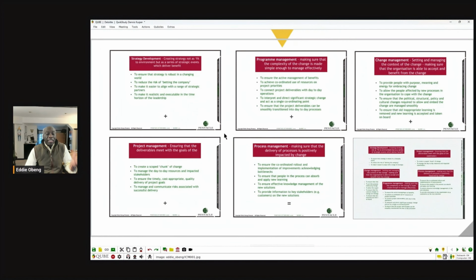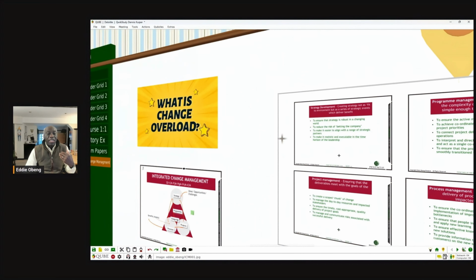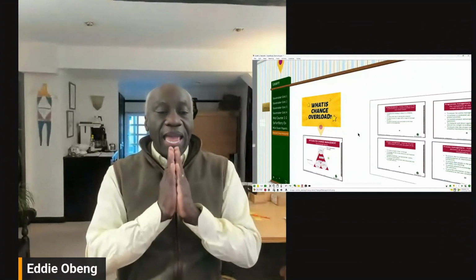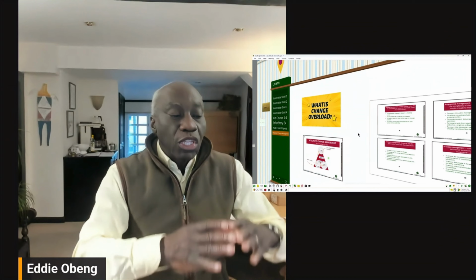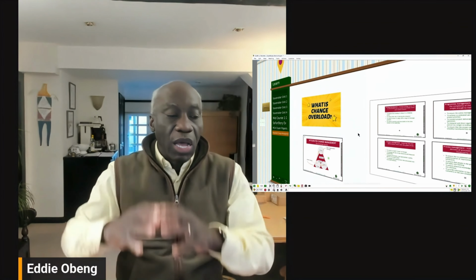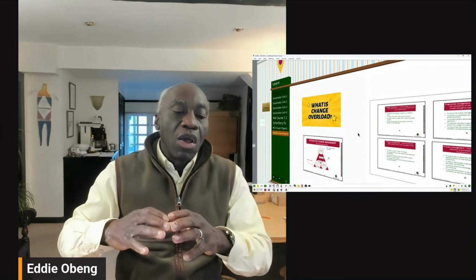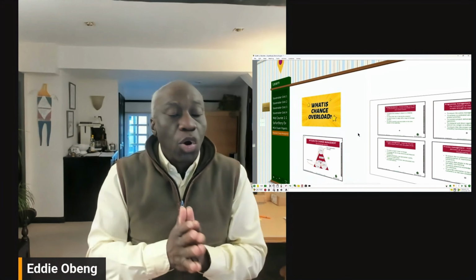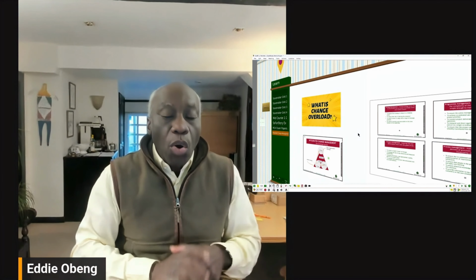So integrated change management is a way of making sure you never end up overloaded ever again, by making sure the people who have the roles know that they're connected to other people, having a dialogue and a process where they can meet and align, and make sure, and this is my rule of thumb, that there's always plenty of holes. Never ever plan anything to absorb more than 60 or 70% of the time or resource available, because that 30%, something will come along and fill it. Either you'll end up having to do some rework or something new will come in. And once things butt up against each other, they stop.